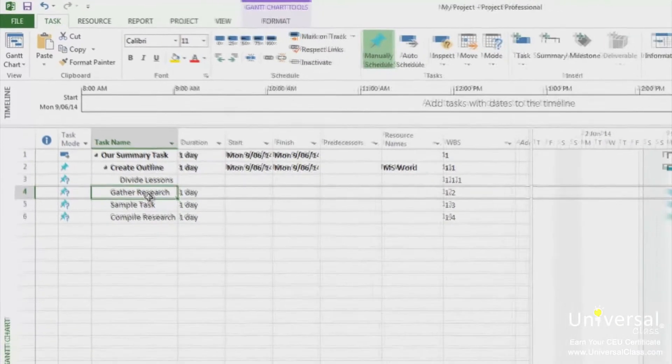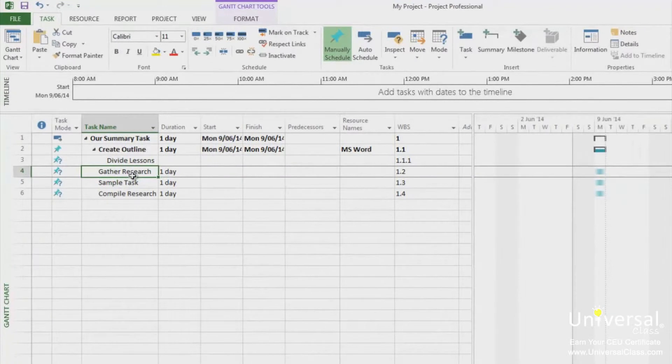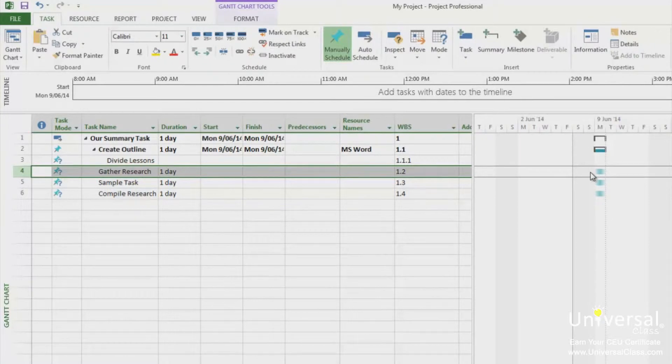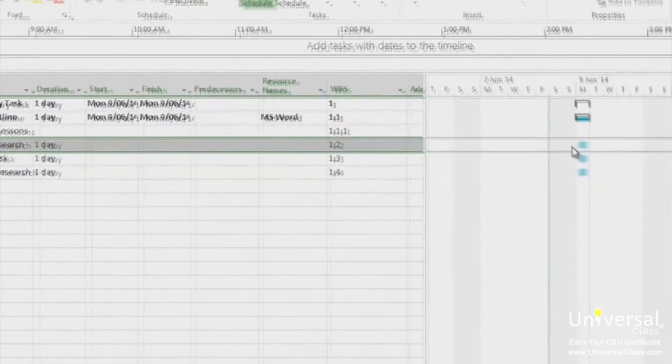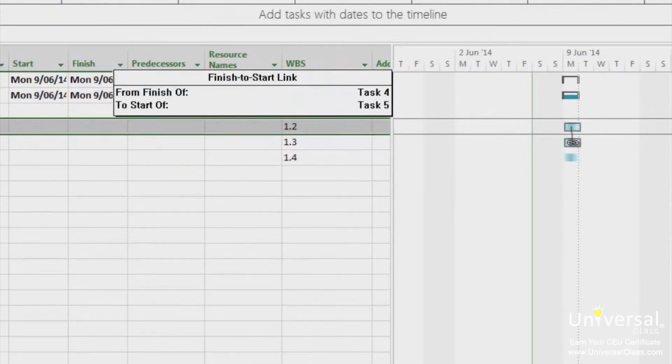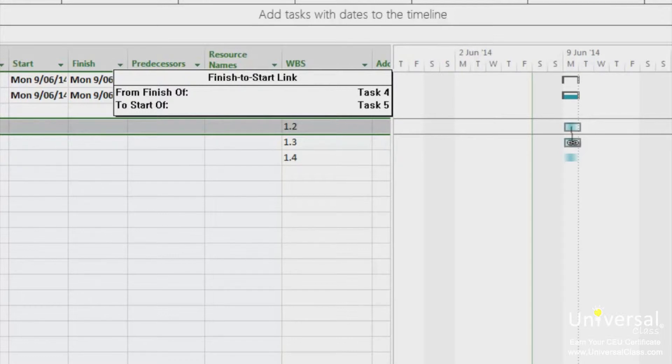Click on the predecessors taskbar or the tasks you want to come first by clicking on the blue bar. Now hold control and click and drag this task to the successor's taskbar or the second task you want to link it to. When you do, you'll see a line drawn in the chain link symbol.